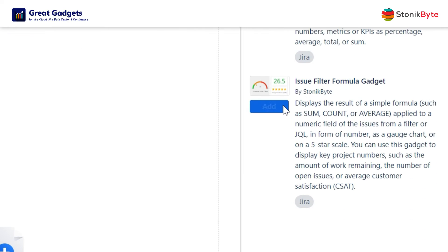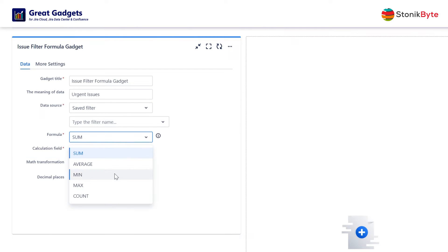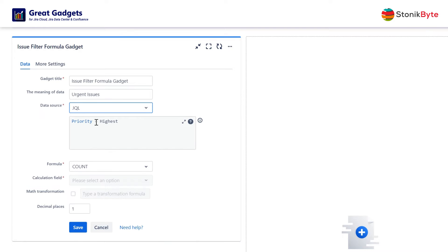Let's see some use cases. Let's say you want to display the number of urgent issues in your project. To do this, add the gadget to your dashboard and then configure it to apply the COUNT formula against the filter that returns the urgent issues in your project.